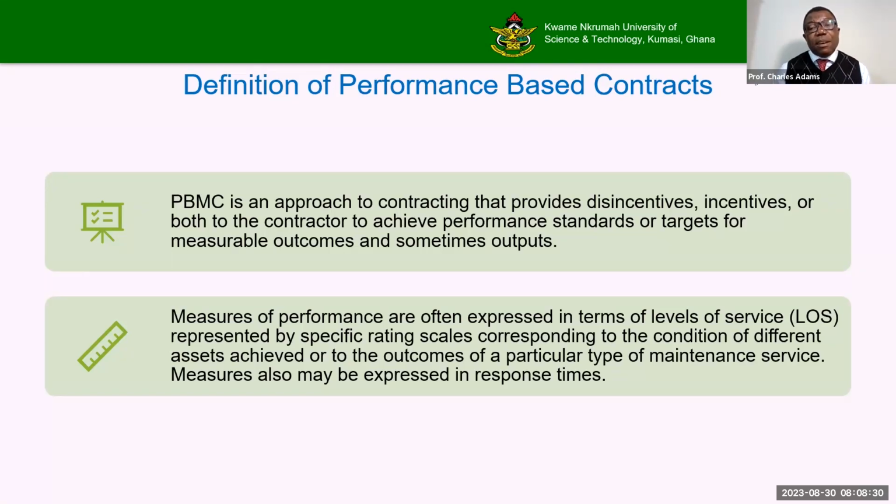And when he doesn't follow it, you penalize him in his payment. For example, if safety wise, his employees don't wear PPEs, you can penalize him. Or if he doesn't follow environmental requirements, then something can be deducted from the payment, just to make him follow the standards that we have set for ourselves.